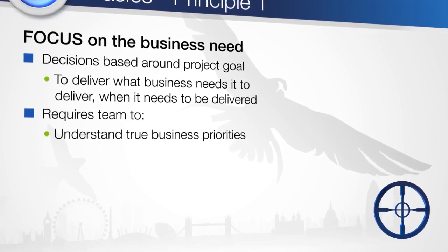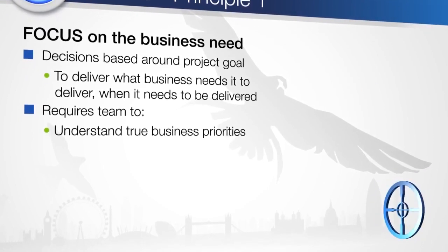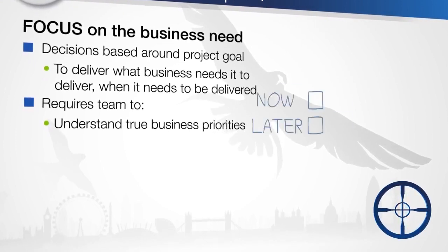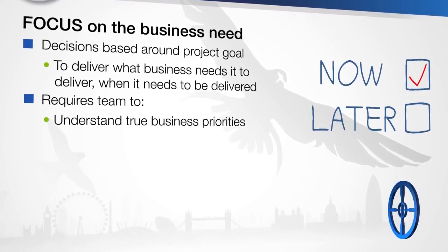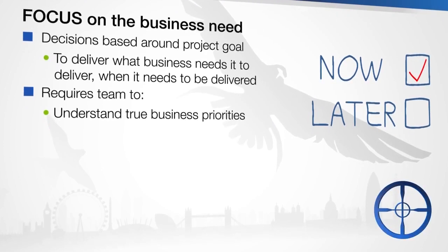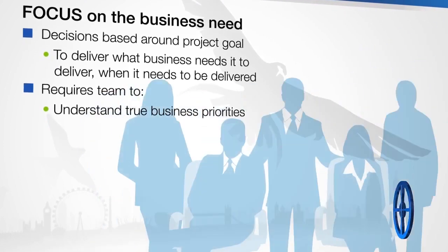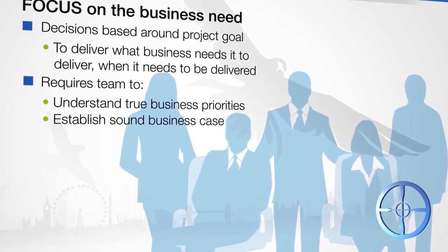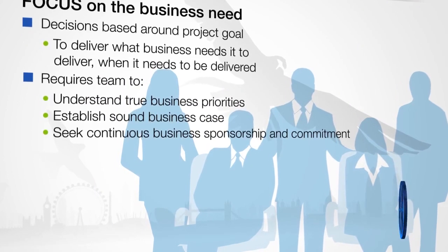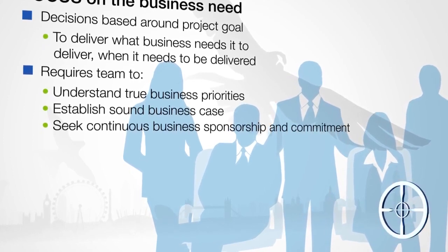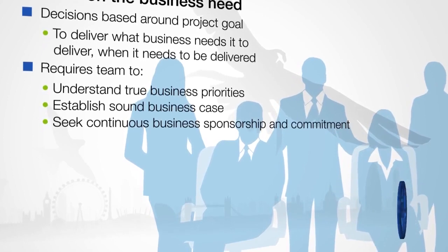Agile Project Management has a high level of direct involvement from the business representatives on projects and in project teams. A lack of commitment to providing resources from the business to an Agile project team is often the source of failure for Agile projects. Managing stakeholders so that the business delivers on these commitments is critical. If the business is not involved, or if they do not deliver on their commitments, even an Agile project with the best team of developers in the world will fail.